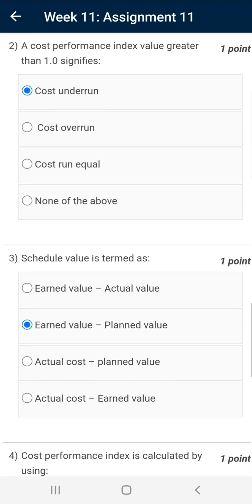Question number two: a cost performance index value greater than one signifies — the correct answer is cost underrun. Cost performance index is defined as earned value divided by actual cost. If this value is more than one, it means actual cost is less than earned value, which is good for the project. This is called cost underrun.